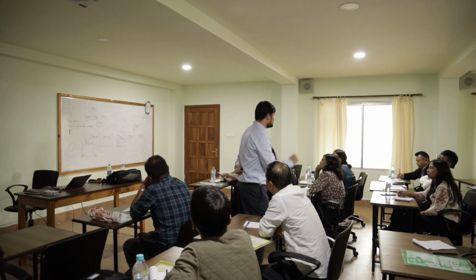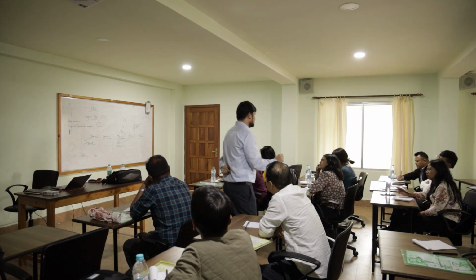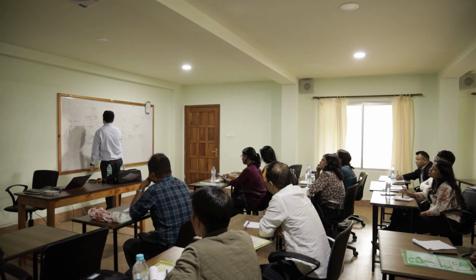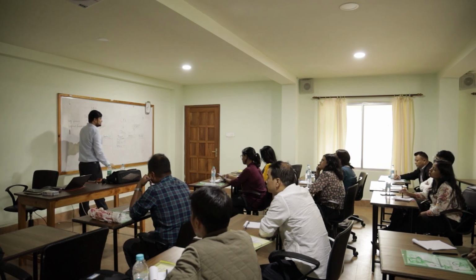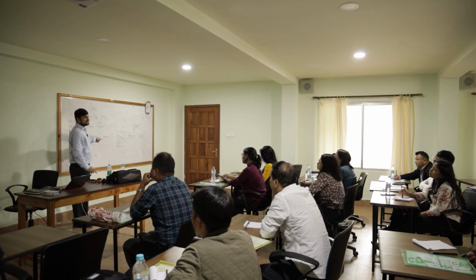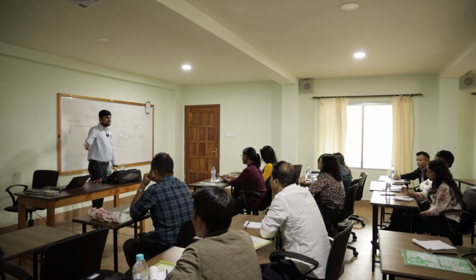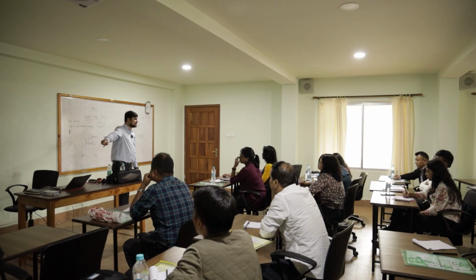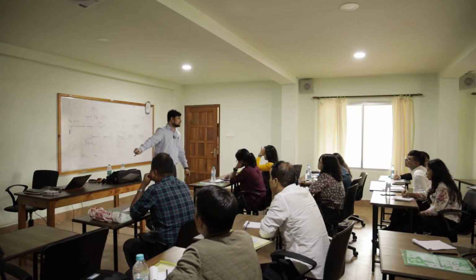It has to be approved by the concerned project director, and then it is accepted. Otherwise, it is not. Okay. So these are the two documents that I am talking about. And usually these PAD documents and PIP documents have a fairly detailed results framework. So the document that I was showing you with the baseline and the endline targets is from the project appraisal document.